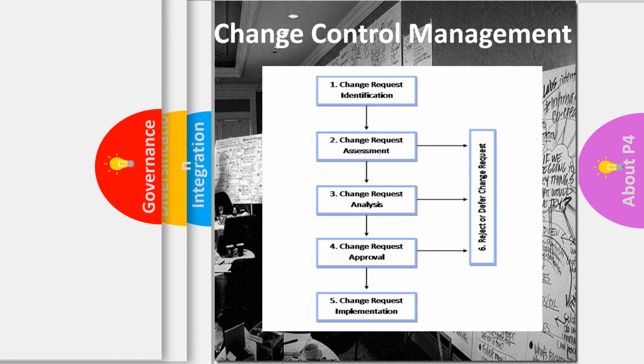But at the same time, that also leads into point six, where it can be rejected or deferred at any given time. So these then need to be factored in, and then how it's factored back into your scope, your work breakdown structure, in terms of your costs and your budgets, and getting all these agreed and signed up with stakeholders as well. If you've got all the documentation there and you do have change, then you can justify why things cost more, or why it took a little more time, because of changes that needed to be made and were specifically requested by key influential stakeholders.